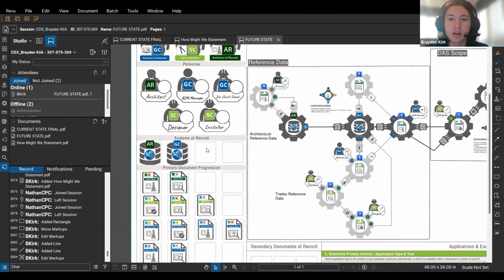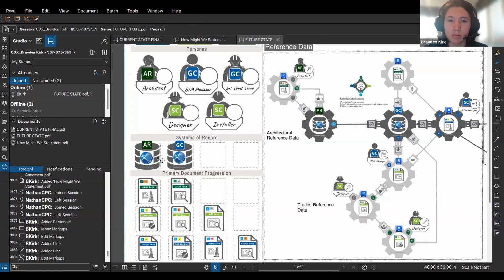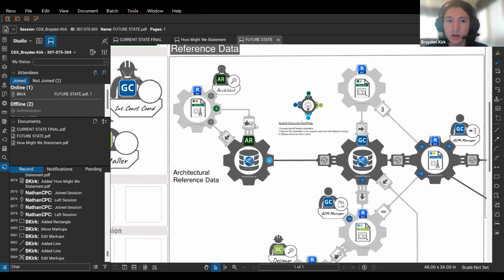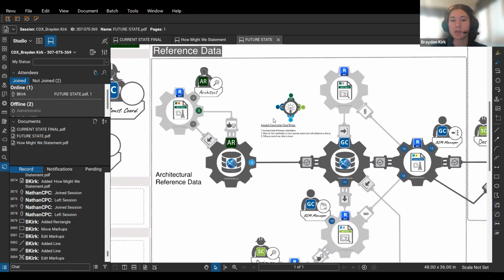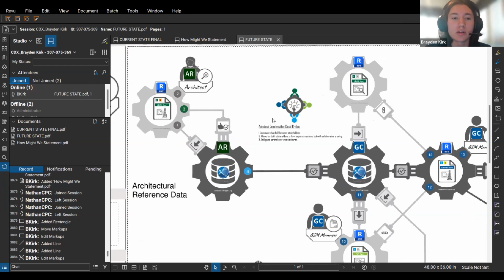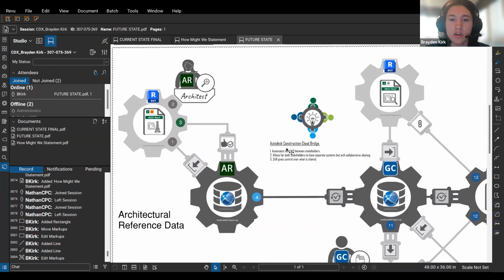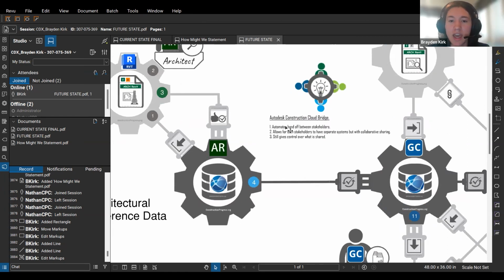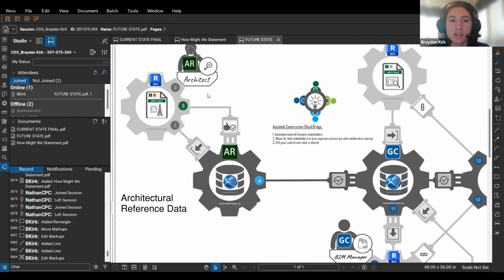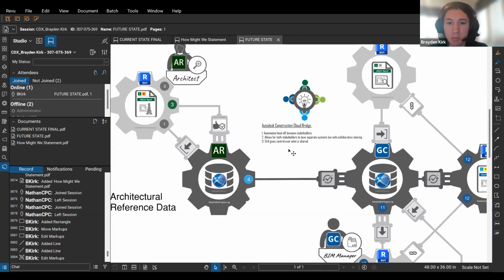So the biggest thing that changes with the systems is just going from BIM 360 to Autodesk Construction Cloud. And then we'll go from there. So the first thing, addressing those first couple pain points of that manual handoff of architectural information from two systems of record, that I found would address this is a new Autodesk Construction Cloud bridge feature, which is relatively new and hasn't been utilized in very many projects within Mortensen at least, but essentially semi-automates that handoff between stakeholders. So the architect is able to decide which files to share and if they will be automatically updated as changes are made.